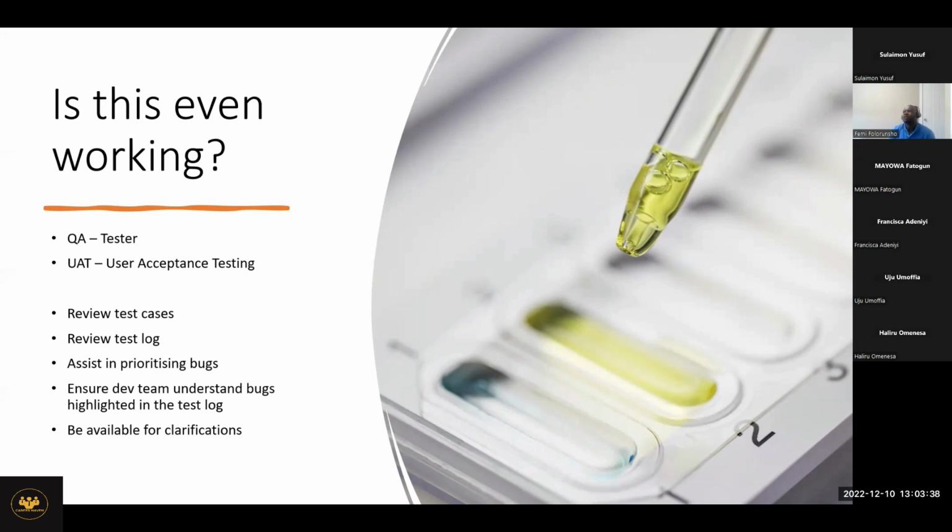Let's say I want to have a really practical example. So with our leave approval application, inside the leave we say that they can upload medical records. According to the government, the employer should not have access to the medical records of employees. So this is a government regulation. But when you were getting your requirement, you didn't see it, you missed it. And now you are in testing, somebody in compliance comes up and says, hey, I don't think that the documents that you uploaded should be visible to anybody.